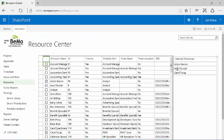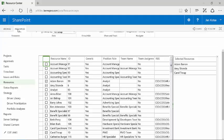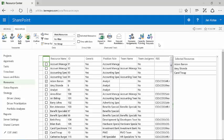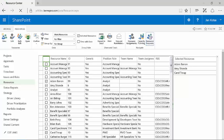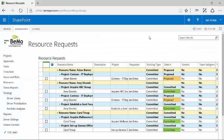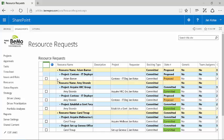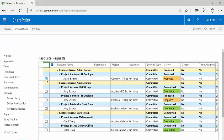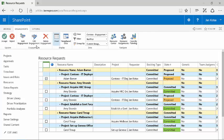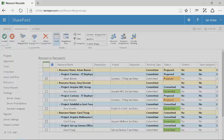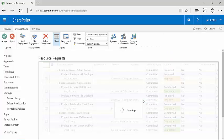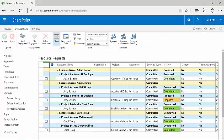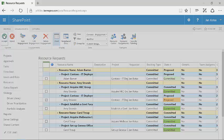I still have Adam, Amy and Carol. But this time what I'm going to do is I'm going to look at the resource requests. And here are the resource requests. And here is a resource request for this Contoso IT deployment for Adam. And you'll notice that I'm now playing the role of a resource manager. I can go here to Adam and I can say I'll accept that. And I can make a comment so that the project manager knows my feelings. And I can say OK. And basically I can do the same for Amy. And I can go accept.